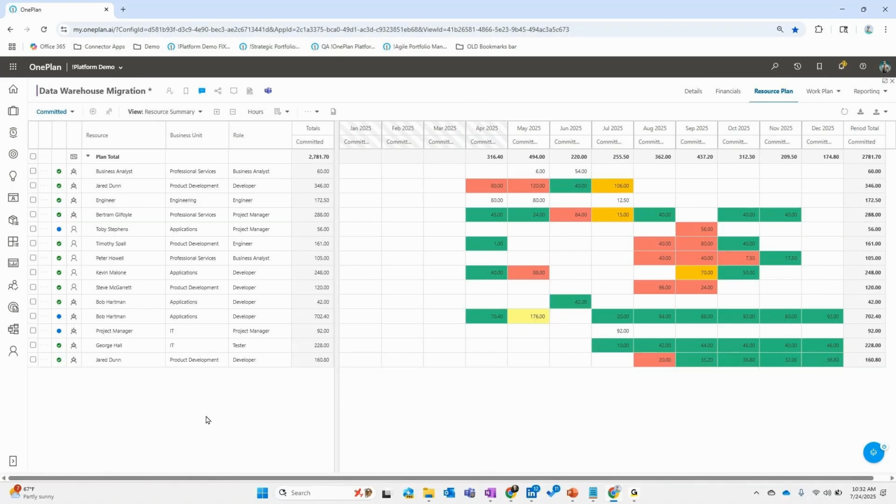And when you look at this, in this particular case, I'm looking at what's called a committed plan, which correlates to that top-down planning we talked about earlier on. I can do this plan long before I have a work plan or a schedule. I don't need detailed tasks or anything like this. And I can even plan in terms of hours. In this case, I've got it by month. I can plan in terms of hours like you see here.